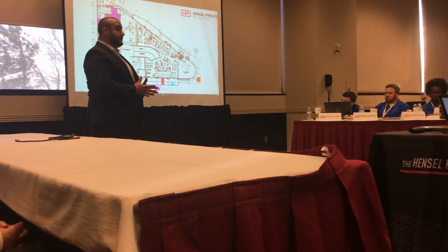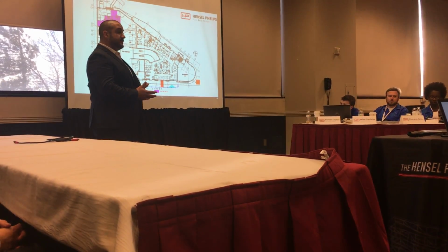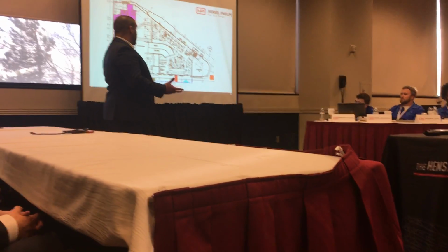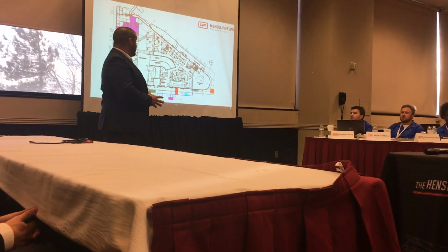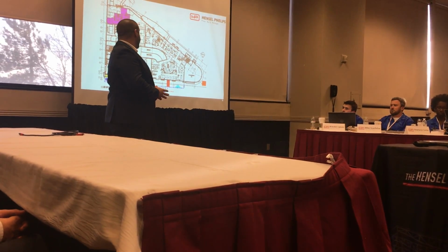Now we decided to go with a material hoist and man lift because of the length of the steel studs. They're 14 feet, 6-inch high walls, and with that our elevator, the utility elevator, cannot accommodate that.